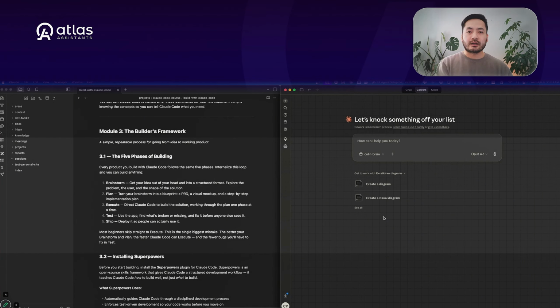It's the same with product. You want to create the brief first, which is the PRD. Then you want to create a clear project plan with these are the phases, these are the tasks, and then you go and you execute step by step, task by task, phase by phase, sequentially. The clearer the PRD and the project plan, the easier execution will be. And so that's the second phase here.